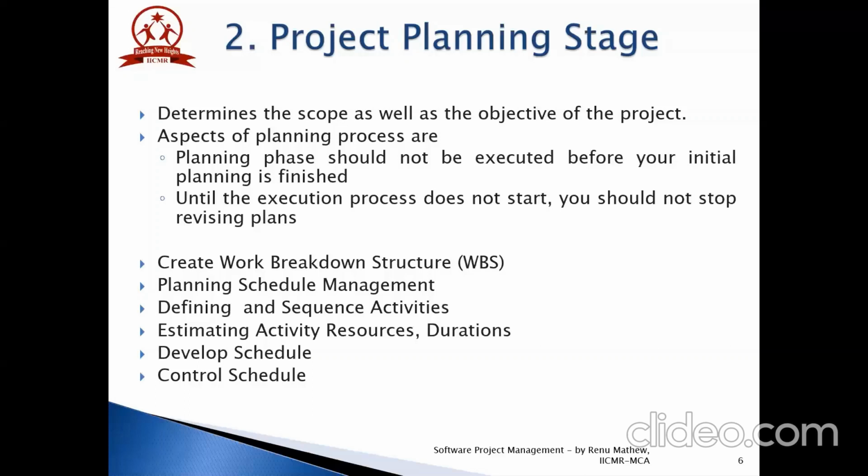You will perform the activities in an order, like choose a country, get business permit, hire a manager, buy a property, buy office materials, and then open the business. So what you have done is that you have arranged the activities in a sequence. Once the activities are arranged, the manager estimates activity resources.